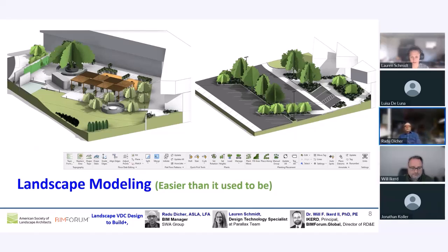If I can speak to that, it's a high request. 3D coordination is probably, historically speaking, the most high return or most sought deliverable. But it is absolutely a need in our projects. A hot coordination item, civil versus landscape, is root balls versus site utilities. That's something that we're seeing all the time.